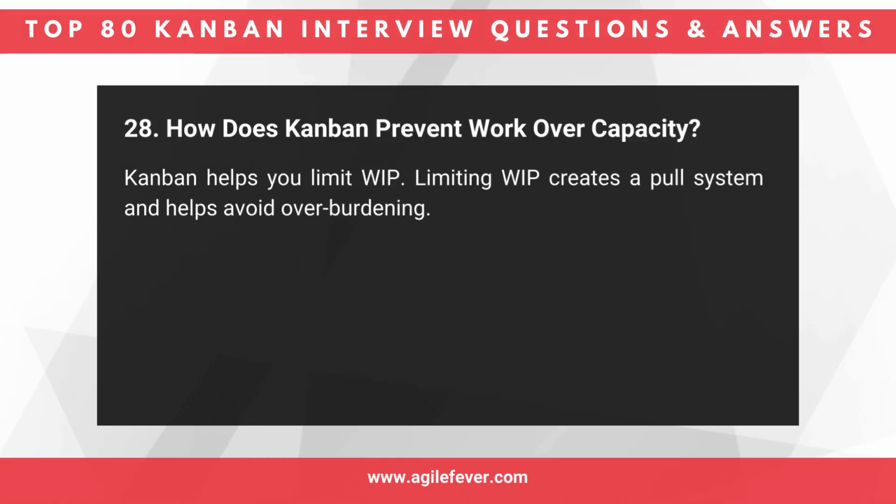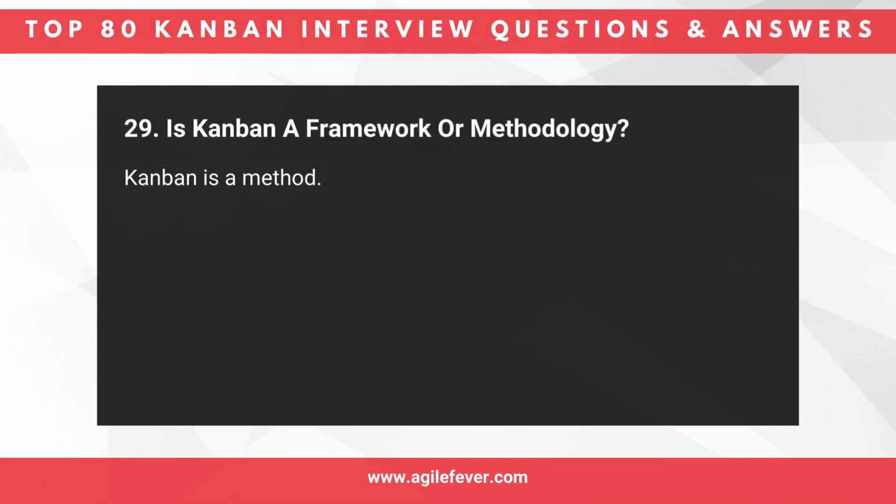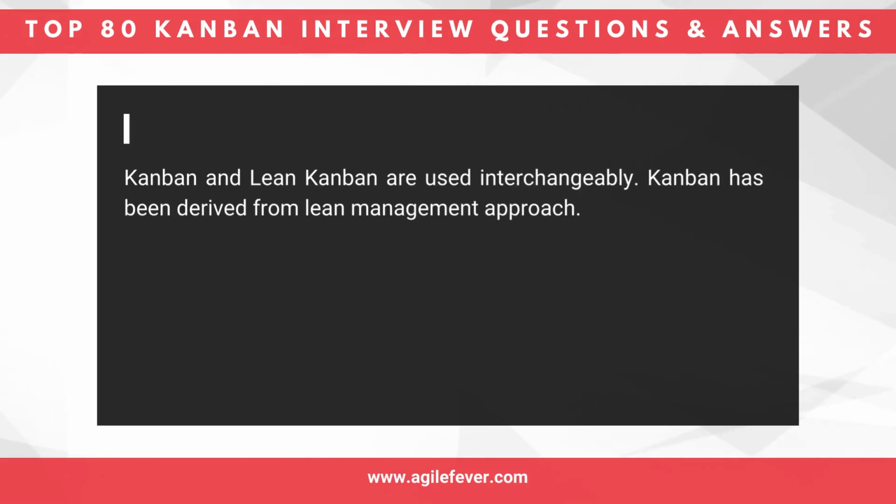Question 28. How does Kanban prevent work over capacity? Kanban helps you limit WIP. Limiting WIP creates a pull system and helps avoid overburdening. Question 29. Is Kanban a framework or methodology? Kanban is a method.